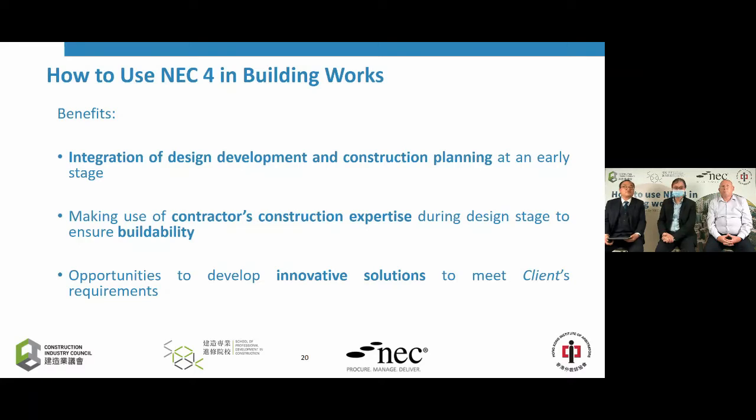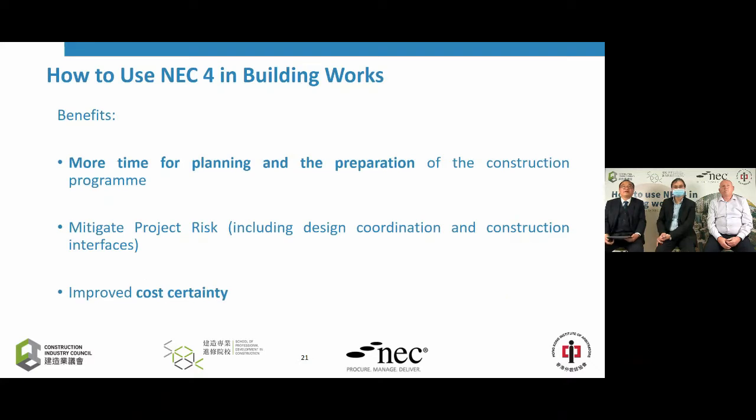The third advantage of using ECI is that it allows opportunities to develop innovative solutions, something that you cannot imagine if you are going to use the conventional design then build approach. Fourthly, it is said that using ECI allows more time for planning and for preparation of the construction programme. And fifthly, the use of ECI will mitigate project risk, especially because you don't have the interface between design and construction, since you integrate them together. You don't have any interface at all, because it will be the same team who do the design and also do the construction. And finally, it is said that the benefit of ECI will be to improve cost certainty.